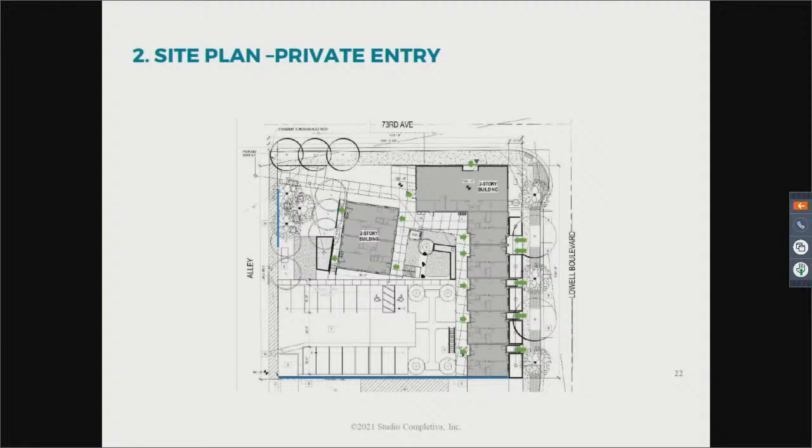Hey, Gary, it's Molly Taylor again. We have been in contact with CGRS, the company that is performing the groundwater monitoring, and they will, starting I believe in June, apply for a Tier 4 voluntary closure of all wells on the site. They will come in right after the site cleanup and they will remove all the wells.